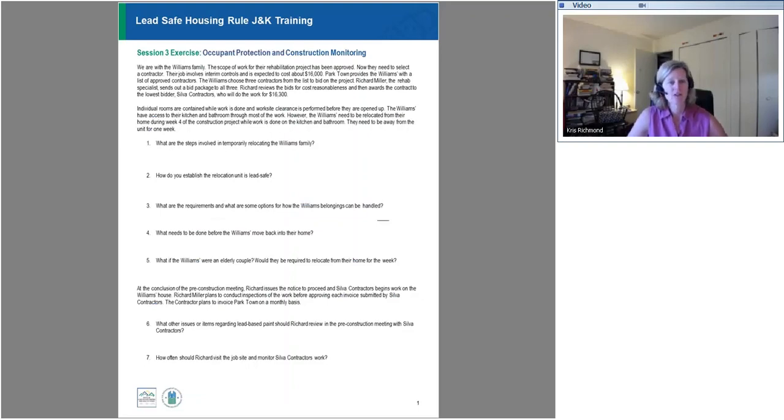Okay. Number 7, how often should Richard visit the job site and monitor the Silva Contractors' work? So this is pretty standard for how often you would go as you're doing a regular rehab at job startup. So these are different critical times. Job startup, before any new work is covered, such as before drywall or concrete, after installation of lead-safe protections or containment, before major dust-creating work, you want to go and visit.